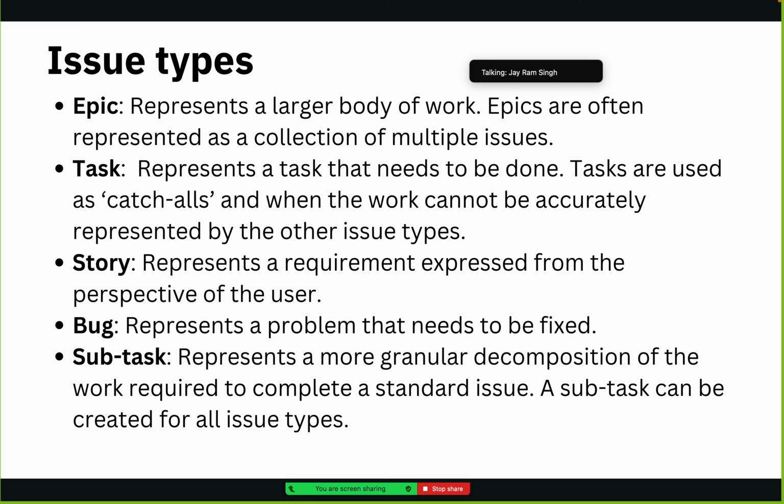The homepage can have navigation, logo, sign in, sign out features, hero teaser, central section, footer, newsletter. Combining all these different tasks, we can give one common name, like home page completion. The home page can be an epic, and the different small tasks can be different issues.